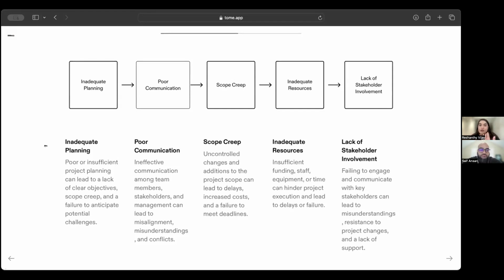And then you're burning your budget, you're burning your resources while the project is not being delivered on a timely basis. And then you also have situations where the new ask doesn't pertain to the team that you have. There may be certain skill sets that our team members don't have. Then we're stuck in a situation where we're venturing out to find those extra resources, and we're putting up money from our project itself, or the company is putting money out where it creates a loss.